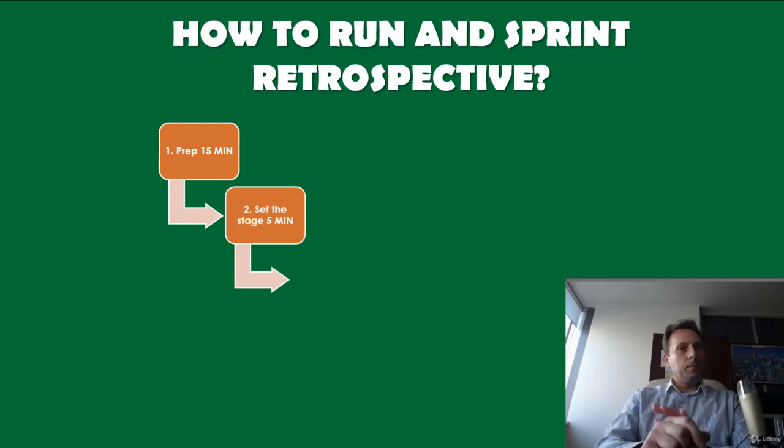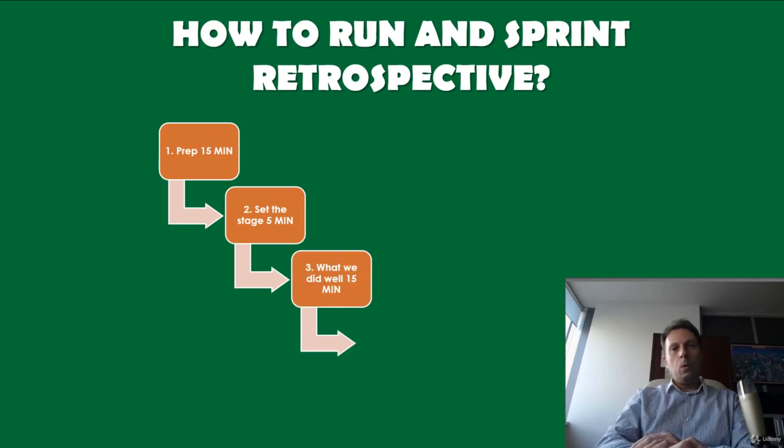Set the stage. 5 minutes. Don't take it personally. Listen with an open mind. Everyone's experience is valid. And set the period you are discussing, for example, last sprint, last quarter, the entire project, etc. And focus on improvement rather than placing blame. If you have run a retrospective previously, quickly revisit the themes and actions from the last time to build a sense of continuity.